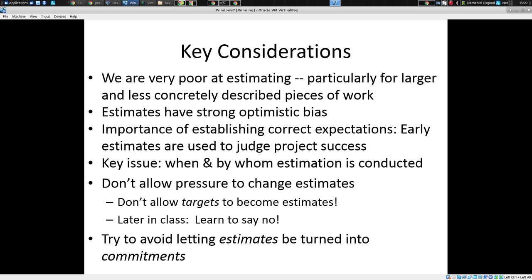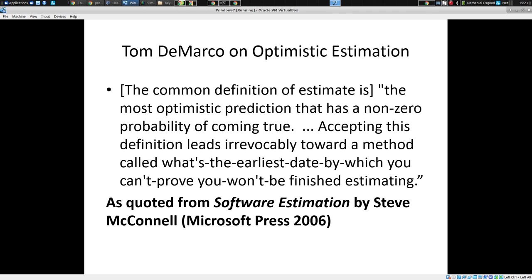And what do we give instead? A range. We say, well, you know, it could take 2 weeks. It could take 2 months. And that opens up the conversation. What do you mean it could take 2 months? Well, we really need to prototype something with this new technology we're thinking about using because we don't know. It communicates uncertainty. It gets a conversation going about what's needed to narrow that range estimate. Giving a single number is like giving them the rope they'll hang you with sometimes.